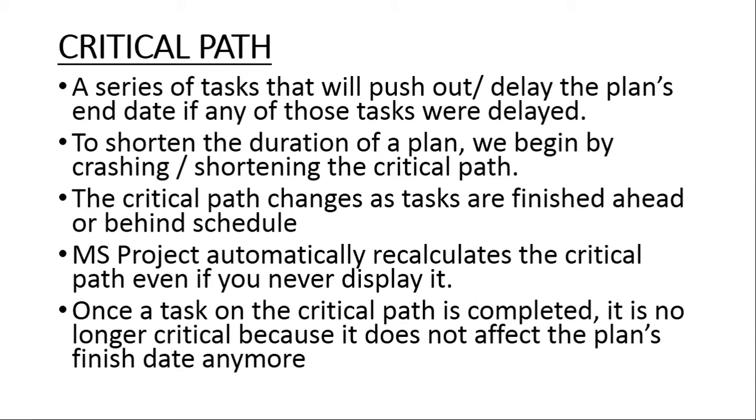MS Project will automatically recalculate the critical path even if we never display it. So the fact that you have not gone to see the critical path doesn't mean it's not there. It's being calculated and recalculated all the time, regardless of whether you displayed it or not.